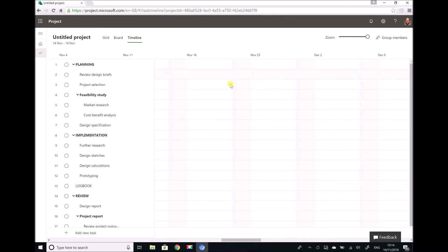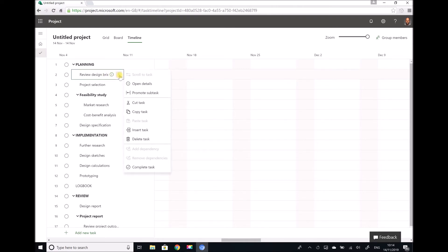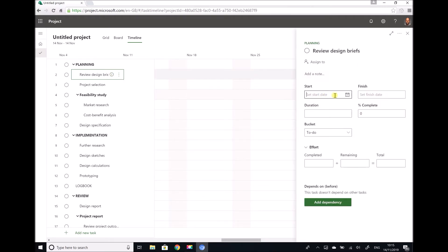The next thing we want to do is start assigning some start dates and task durations to each of these activities. Starting at the very top, we have review design briefs. From the previous video, we wanted this task to start on Monday the 18th of November and last just two days. There are a number of ways to access this menu — we can click on the three dots and go to open details, or open details is also available as an option alongside the title. So we set our start date as November the 18th and our duration as two days, then close it off.